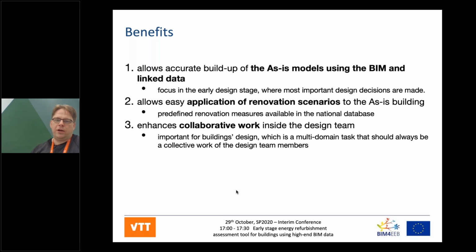If you can make the decisions in the early phases, then it's much easier to select those and maybe make some changes to the plan. If the process goes further and decisions are made in the end, then it's much more difficult to change anything, and it gets easily costly.